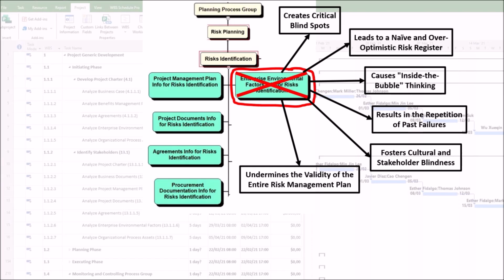For example, the project has a large risk budget for potential overtime to handle scope creep, but no budget allocated for a potential currency fluctuation, an economic enterprise environmental factor that could increase the cost of critical imported components by 30%.